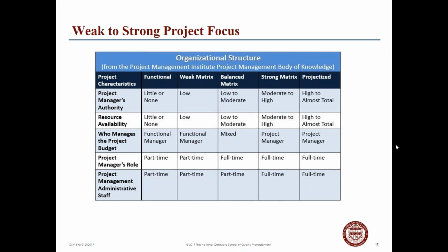And what are the business process guides, or the business processes, and what are the deliverables post-project, so that we know what we did in the project. So in a computer-based project, you need a full book of knowledge of all the work that was done. If there was an upgrade to the system, the rationale of why you did a particular programming of a particular area or process in this way, so that when you look at upgrades and things like that, you know what the impact of the upgrade is, and where you have to pay attention.